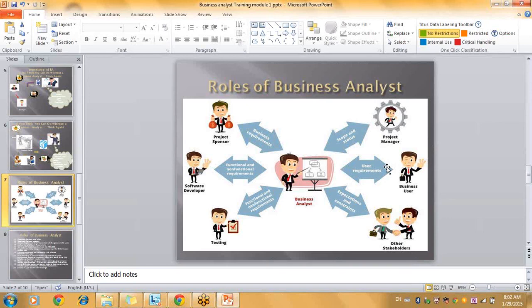Okay. And when I say it's more on the dates, basically the schedule, how the project is going to go from planning phase to deployment phase. Starting with the envisioning phase, planning phase, estimation, the project manager reaches out to the developer saying, okay, now you've got your requirements, give me your hours of estimation. So for example, there is one requirement, how many hours will it take for you to code it and get it developed? He might say it needs 40 hours.